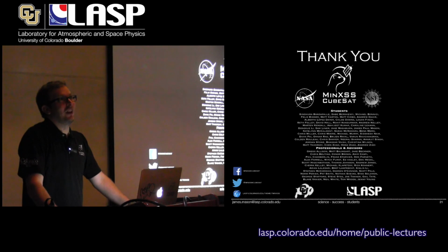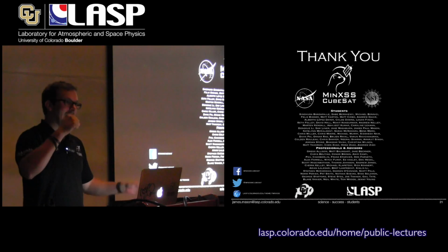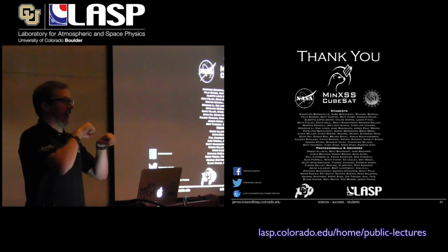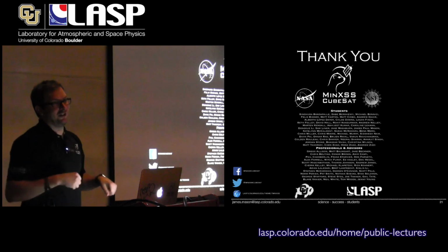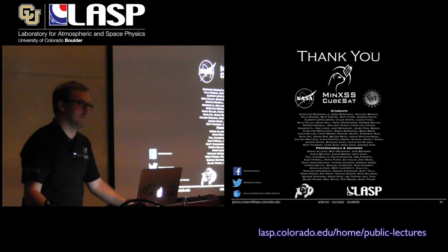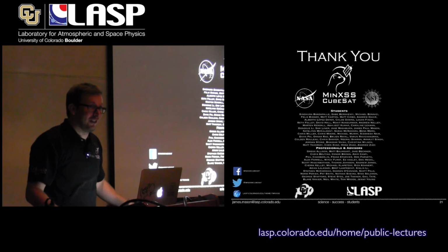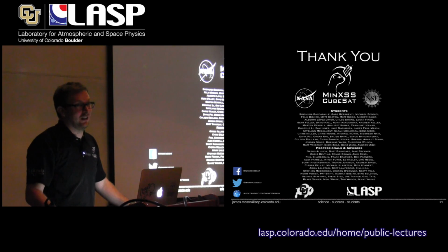Yeah, like the CubeSat design specification by Cal Poly has included lessons learned like that and turned them into requirements. Like you can no longer have permanent magnets stronger than a particular strength, because one time there was a CubeSat with a strong magnet and there was another CubeSat in the deployer, and they came out and were stuck to each other. And so they couldn't communicate, because their antenna would deploy or whatever, but the ground plane's all screwed up because they're connected. So now that's a requirement that you can't do that. So I think some of that gets captured in the design specifications, but I don't think there's anybody that's been focused.